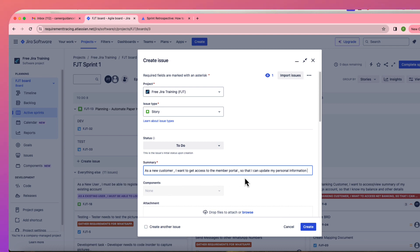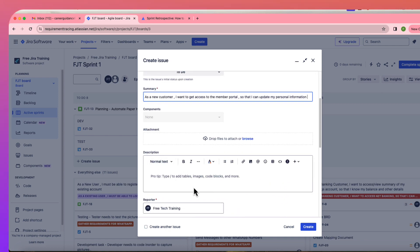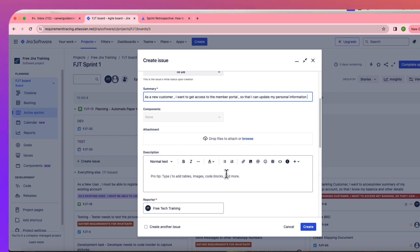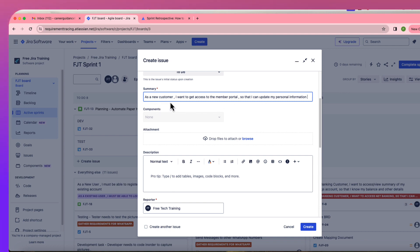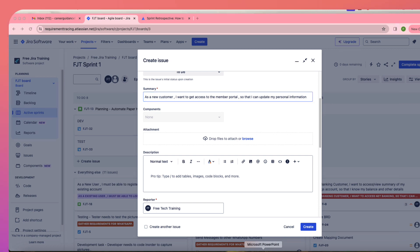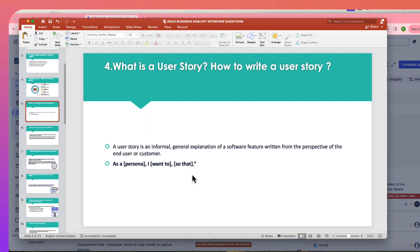A user story always starts from the customer's view — you say what the customer wants to do and why. In the summary or headline it's always a one-liner like 'As a new customer, I want to... so that...' In the description you add details: the member portal link, what the first page looks like, login page, how to register. This is the standard way of writing a user story.